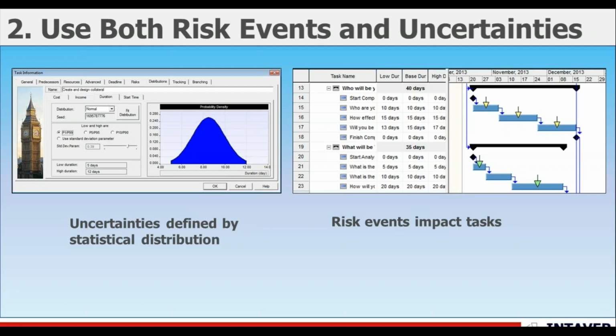While this adds more complexity to the model, there are some tools and processes to minimize the effort without sacrificing accuracy. Uncertainty bands allow you to distinguish levels of uncertainty that automatically calculate estimated ranges based on historical data. And risk events can be efficiently assigned to activities using drag and drop. This eliminates much of the detail work that was previously required when assigning risk events to schedules.